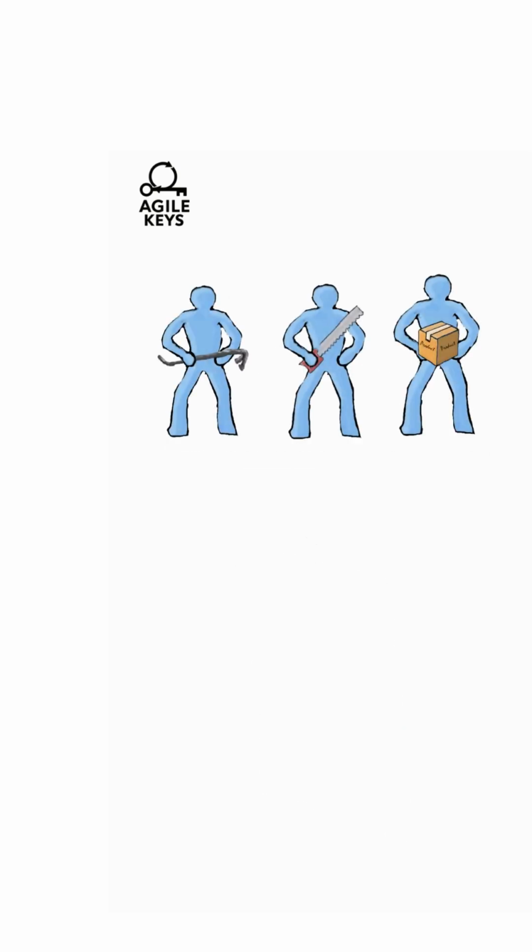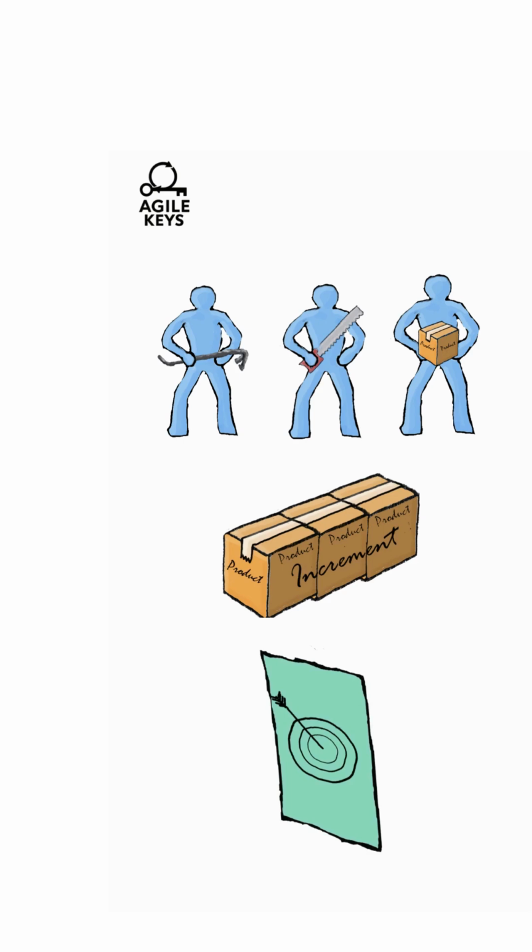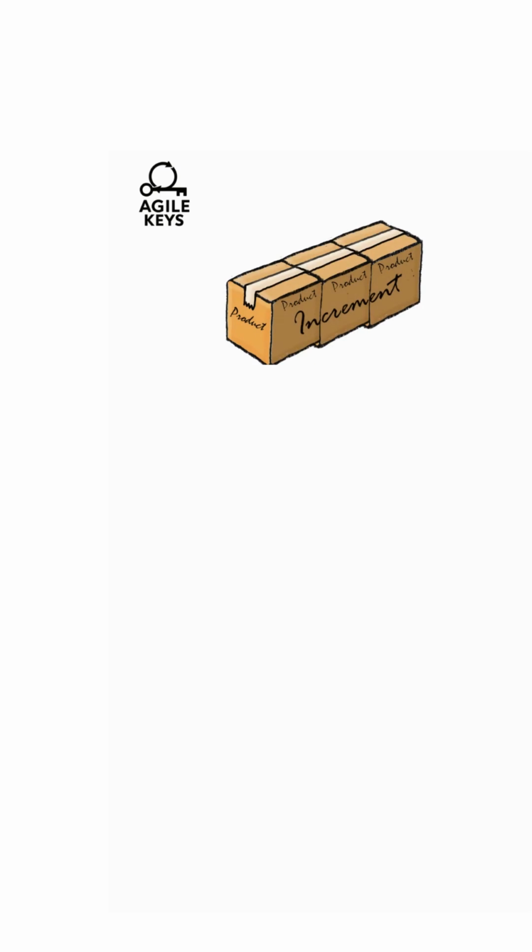If they are, then the plan is still viable for that day's work. If not, the team may have to get together and discuss how they can make different increments but still satisfy the sprint goal, as this does not change within the daily Scrum. The daily Scrum may also highlight any impediments that are stopping the developers from completing the increments. They may want to talk to the Scrum Master after the event.